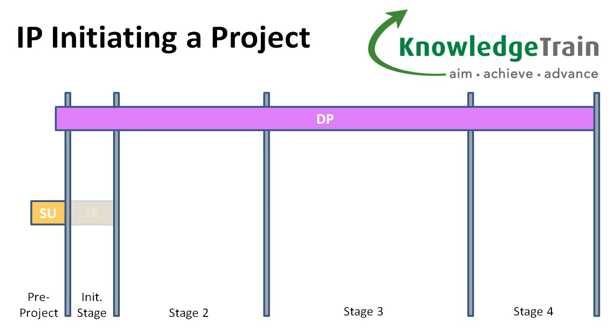Initiating a project is performed by the project manager. During this process, the firm foundations for the project are established so that the organisation understands the work to be done before committing to a significant spend. It is when the project plan and the detailed business case are written, as well as when the strategies for managing risks, changes, quality and communication are developed. At the end of this process, the board has all the information required to decide whether to proceed with the project.